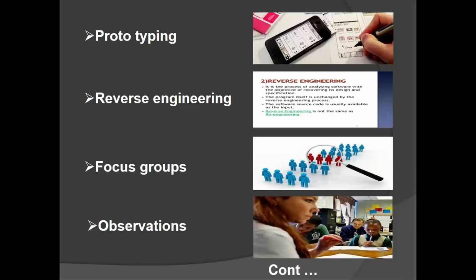So this technique we are going to use for those projects where there is heavy risk in the project and the requirements keep on changing. So for those kind of projects, we are going to use prototyping. So how we are going to gather requirements means, first we are going to prepare a prototype with the initial requirement and we will show it to the client and we will take his approval, and we are going to keep that prototype in the development process.